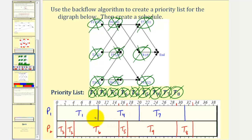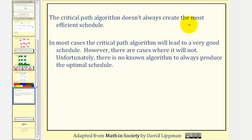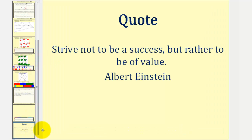Looking at our schedule, notice how processor one is idle from thirty-one hours to thirty-three hours — the time it takes to complete the entire project. Here's a look at the same schedule created by software. It should be noted that the critical path algorithm doesn't always create the most efficient schedule. In most cases it will lead to a very good schedule, however there are cases where it will not. Unfortunately, there is no known algorithm to always produce the optimal schedule. I hope you found this lesson helpful. Thank you.